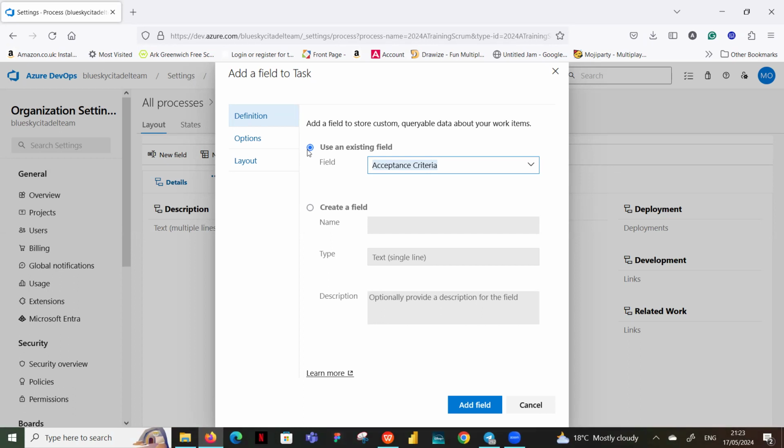So if you have your hours planned as 2 hours and then you ended up doing 3 hours on that, if you have to do a similar task, you would know to say, oh, well, the last time I did something close to this, I think it took me 4 hours, and then you're able to go back to that task and check and find that information there. So these mainly are just to help you keep track and help you also to have history in place. Okay, so that's why we do this. So we've got hours planned, and then we can have actual worked hours.